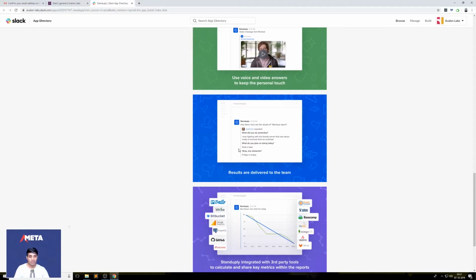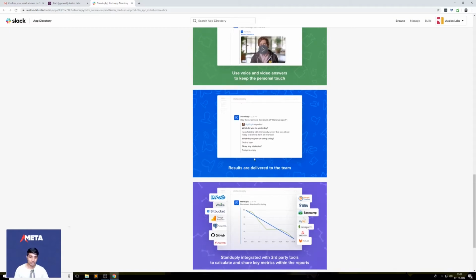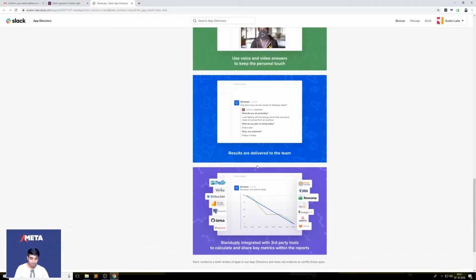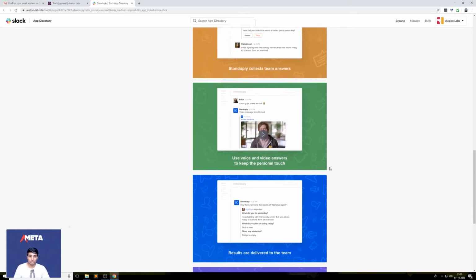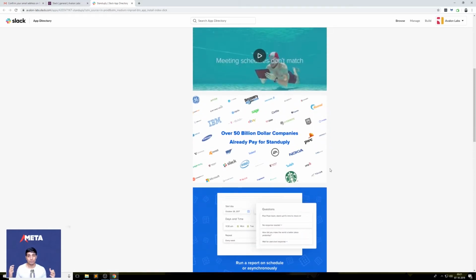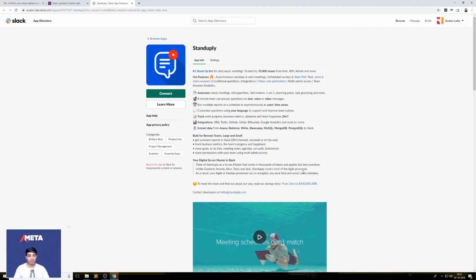So what did you do yesterday? What do you plan on doing today? And what are your obstacles? What are your blockers, right? And it's awesome to use a tool like this because every morning your team manager or you as the product manager, you know everything that's going on. And people know what the other people in the team are doing. And that's very, very valuable. Like I said, your job is communication. Your job is to create an axis around which everybody communicates, and everybody is building the same thing much faster.